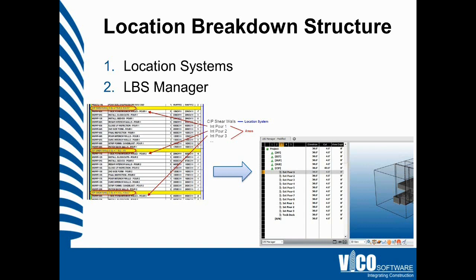In our case, we use our standard database to pull those quantities out and assign them to unique line items that we'll use to populate the schedule tasks. However, in some cases, we don't have models available, or we only have some models available, which don't represent all of the scope, and we can represent those activities manually in that process.